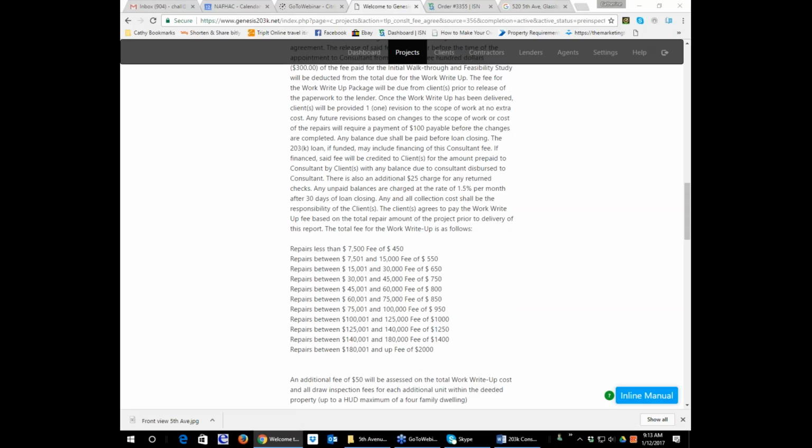Otherwise, you're chasing money. If a lender says, this person is really having trouble financially, could you please accept payment at settlement? Well, if they're having trouble financially, I'm going to have trouble collecting my money. So in that circumstance, I'm going to say to the loan officer, I'm going to need your company to guarantee payment. I need authorization, a purchase order, or some sort of guaranteed payment form from you that says if for any reason this borrower does not go to closing, or closing takes place after 91 days from the initial release of the report, that you, the lender, will pay this invoice for the reports provided.